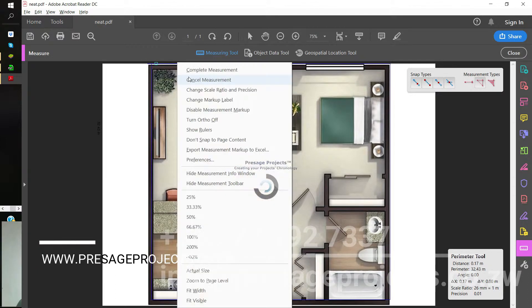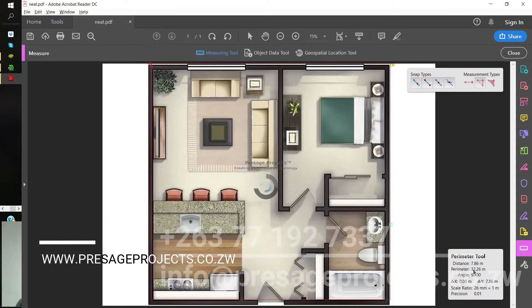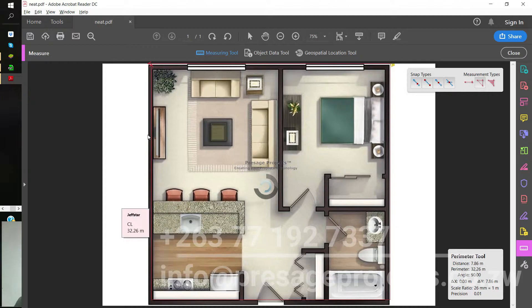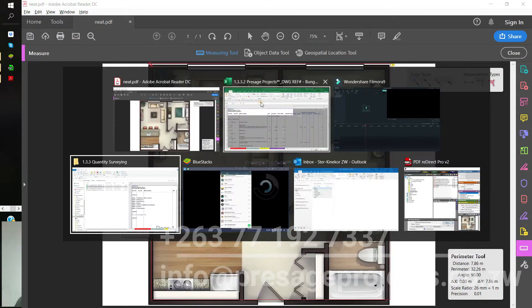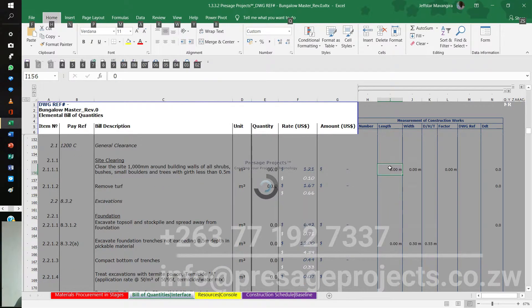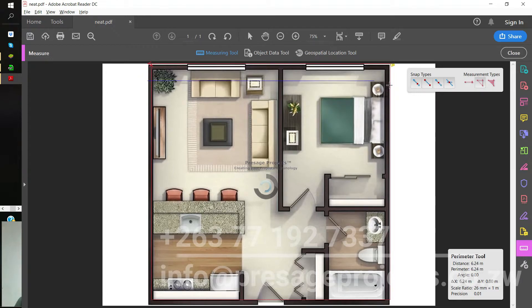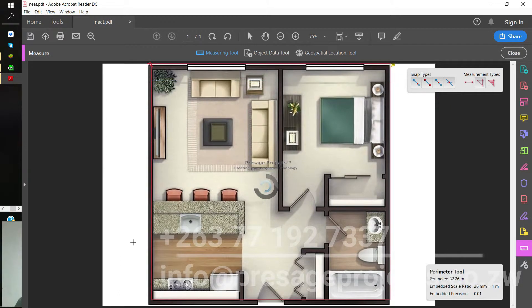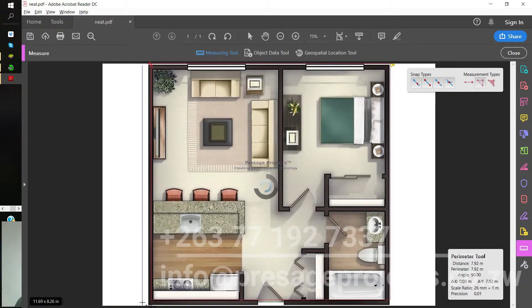Once I complete that measurement, I get a reading at the bottom right corner of 32.26 meters. With that information I go to my pricing module, and I can also start with the length and width of this building — which is about 8.3 by 7.95 meters. That's my length and width.